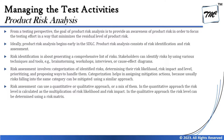There are several techniques to identify the best list of risks possible, and these will be deep-dived at the advanced level. At foundation level we keep it as a simple introduction. Risk assessment involves categorization of identified risks and determining their likelihood and impact. The combination of impact and likelihood becomes the level of risk. We then prioritize them and propose ways to handle them.